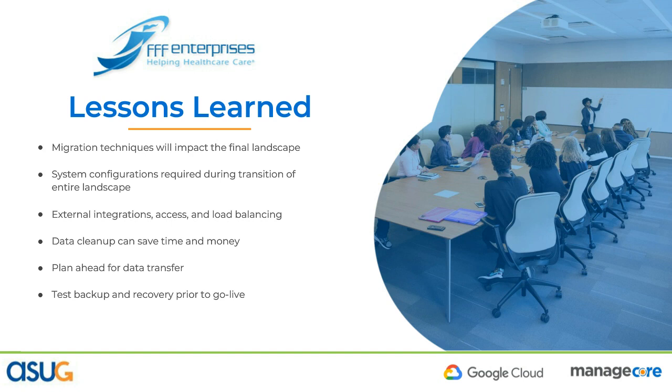On one end, as I mentioned, when you migrate from SAP standard tool sets and you're using export-import methods, generally you're going to end up on a new OS platform, right? So this could be the time to clean up your OS. Maybe your Windows server that you're migrating has a lot of old software on it that you just can't remove. It's a great time to use SAP standard tools to do that functionality. On the flip side, it does take a little longer because you're exporting, transferring data, and then re-importing.